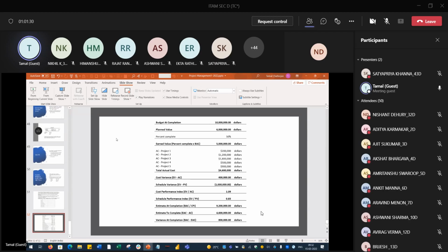So what should be done with the project? Schedule-wise red, cost-wise green. You are earning a good amount, but you are behind schedule. So you ask the project manager, the project lead, what is restricting them from speeding up their work. They will come back and say, I do not have a senior developer on Java or Python.